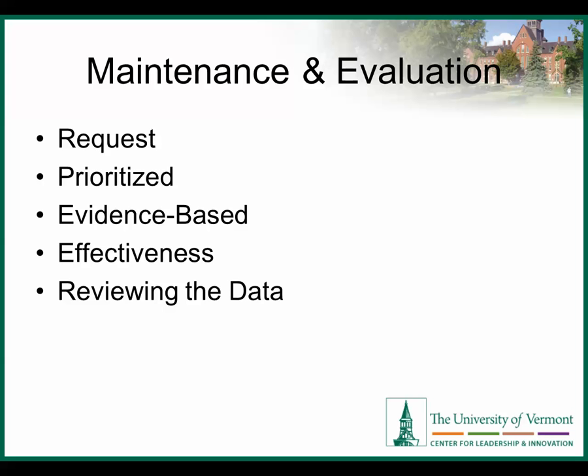And then as part of maintenance and evaluation of the system, making sure that you have a way for end users to request improvements or redesign, that these requests are prioritized based on how long it will take, and also if it's associated with any government policies or quality improvement projects.